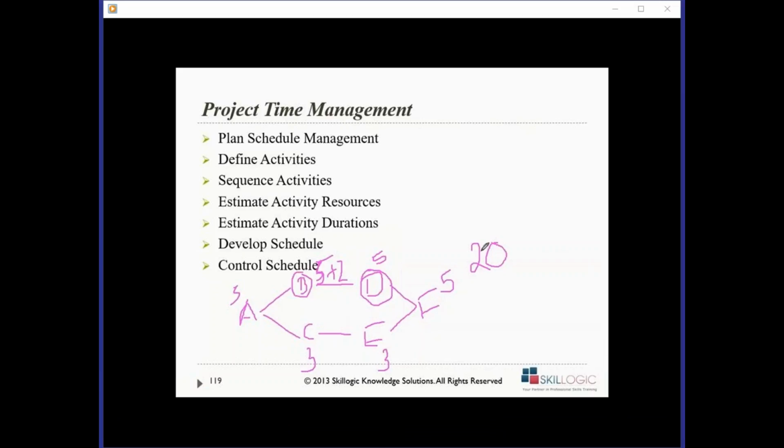Then we need to complete our D job in 3 days. Then only we can meet our deadline. Others, what do you think, guys? So, Somek, what do you think? Would we be able to complete in 20 days overall? So if my B activity is taking 2 days extra, then I need to complete my D activity in less than 3 days, or in between 3 days.